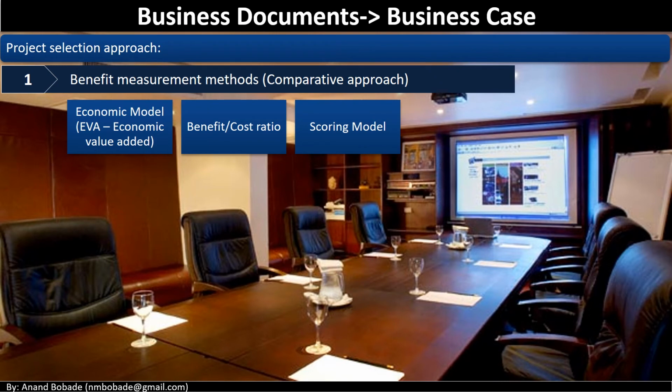Next is the scoring model. The scoring model is an objective technique. The project selection committee lists relevant criteria, weights them according to their importance and priorities, and then adds the weighted values. Once the scoring of the projects is completed, the project with the highest score is chosen.